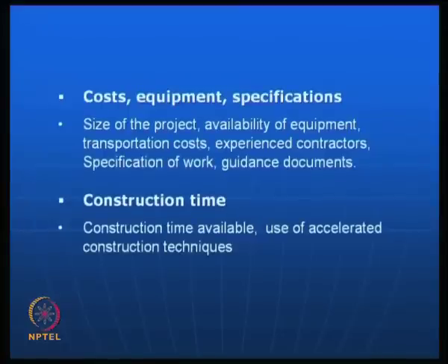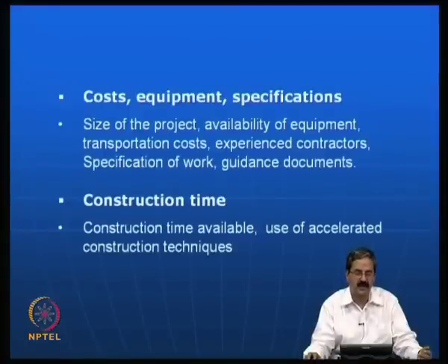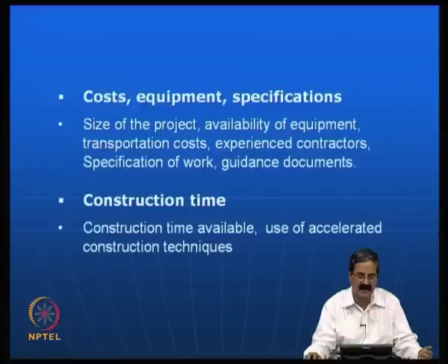Cost, equipment and specifications. This is a very important thing. Size of the project. Are you trying to go for a simple multi-storied building, or a bigger colony? Ground improvement techniques are all done by a number of contractors. Many people would do that. If it is a small project, they may not come. So, you may have a very nice idea about a ground improvement technique, but if the size of the project is too small and the contractor is not ready to come, then it is useless.